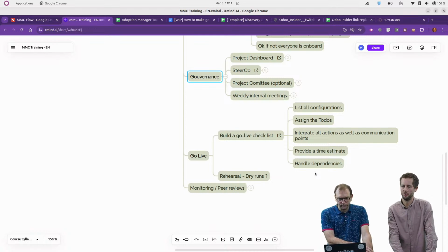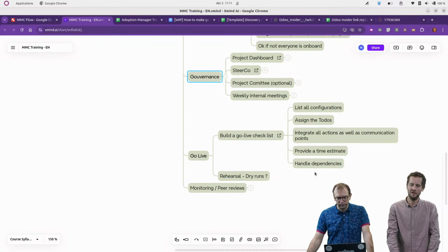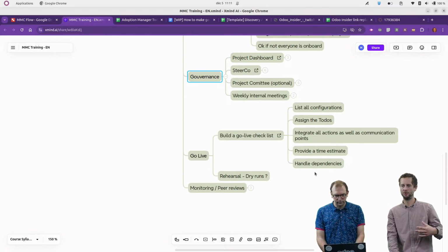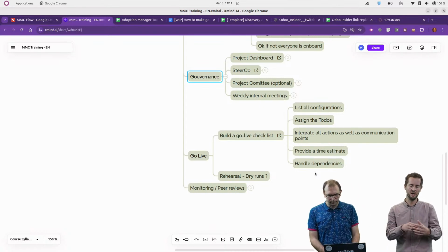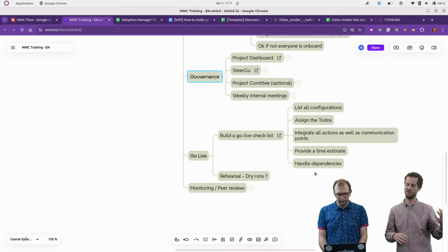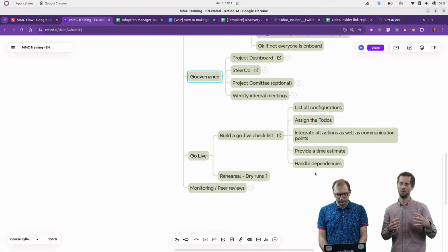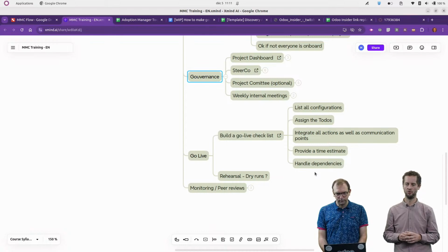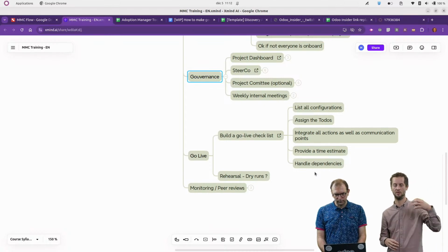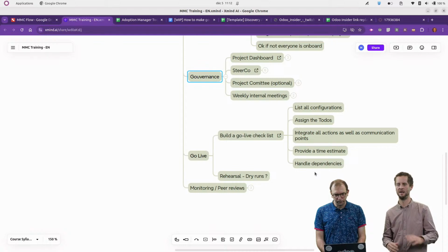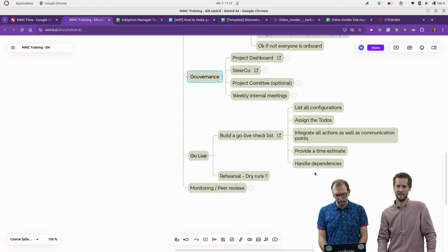And one way also to be really reactive and flexible is sometimes also to go to the customer location, just to be there with the project team, with the key users, so we can also sometimes see and work with them to reproduce the issue or to understand what is the root cause of an issue. So if it's possible, just go there at least for one, 2 or 3 days after the go live, and be there, of course, when you make the switch, just to be as fast and as reactive as possible. We should not wait too much between the notification of an issue and the deployment of the solution at some point. So be there and try to solve it as fast as possible.